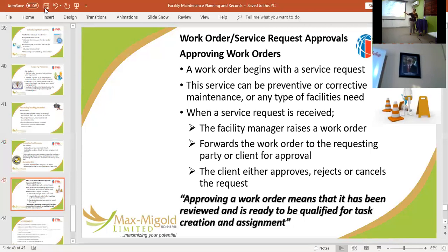Now, let's say we need to replace all the doors in this room. So that should cost some. That's just a work order. I'm not going to attach any cost to it. But what I've now done, I want to give you a practical step by step. You need to record this. I'll call my supervisor, our regional manager. Okay, you're going to send me 3 people to cost, 3 different vendors to come and check.